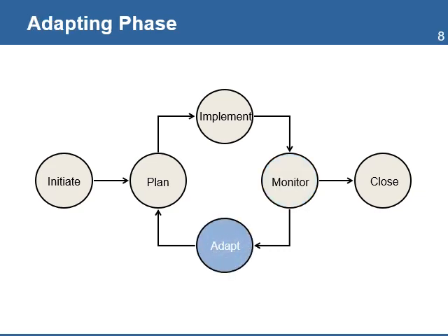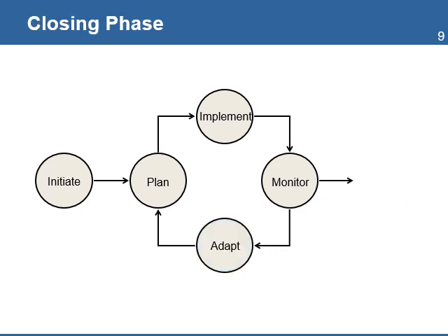This phase is where the project manager and the team will analyze the results of the monitoring phase and make the necessary changes to the project management plans. Changes can occur when risks occur or assumptions change due to a dynamic context. The team and the project manager will evaluate the impact of the changes needed and get approval. The changes are then made on the plans affected so that in the next cycle, the team can use the new plans. This is also a moment to capture lessons learned that can be used in the next cycle.